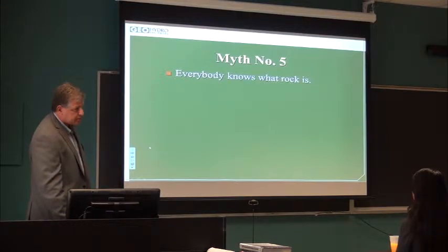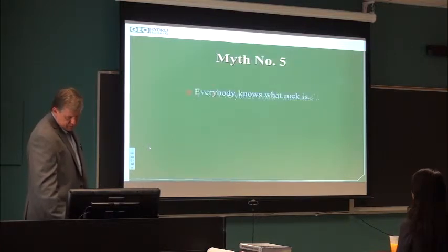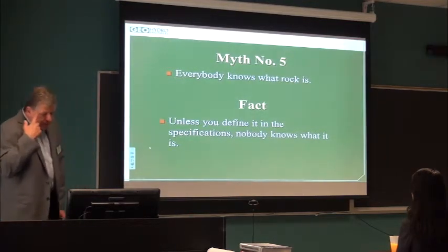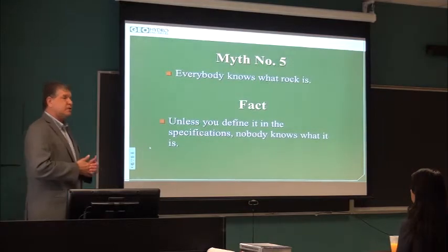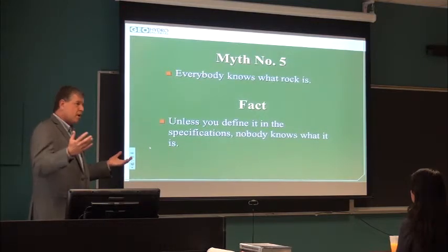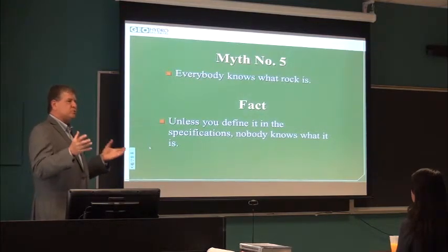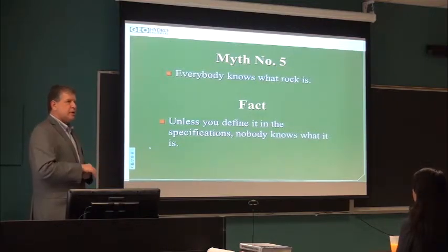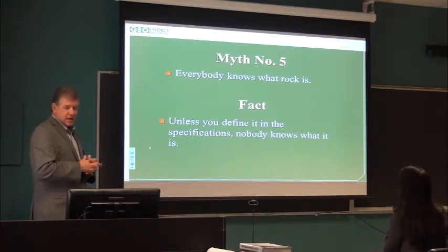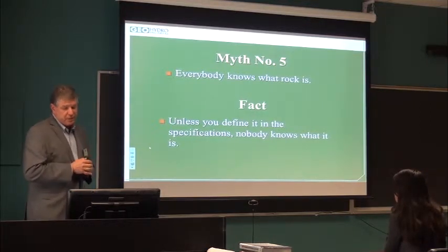So everybody knows what rock is, yes? No? Just hard. Not really. You think that's common sense, but unless you define it on a project, for example, you're grading for a school, a quick trip, whatever, one of the main sources of cost on site development is rock excavation. It's expensive, it costs a lot of money to do. And if you don't define it, if you don't have an understanding of it, and an agreement as to what rock is, it can get you in a lot of trouble. We've seen it.